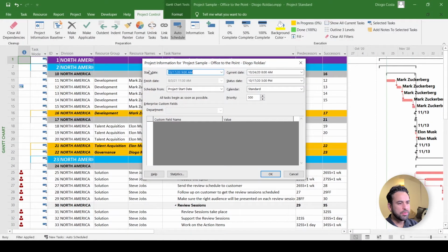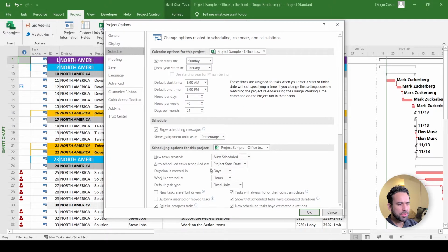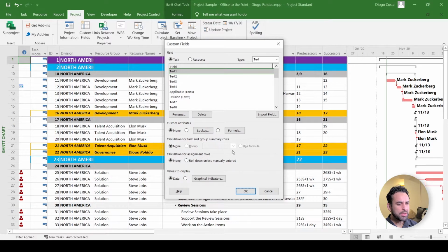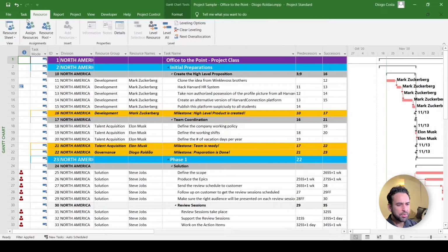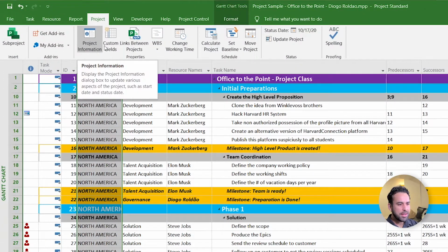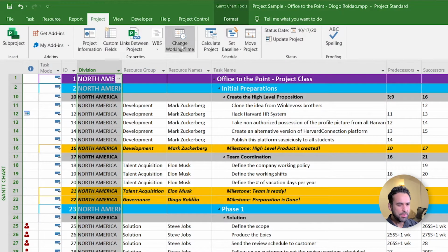Here in configuration, you will care about the following aspects: project start date, project report date, project default calendar, and configuring your working hours, your calendar. Configure how Microsoft Project should display and calculate dates, duration, and progress. Configure your customized lookup fields. And guys, this is a key configuration if you want to call yourself an organized person. Resource management. Add to Gantt view the most common and useful columns, including your brand new customized columns with lookup values inside.